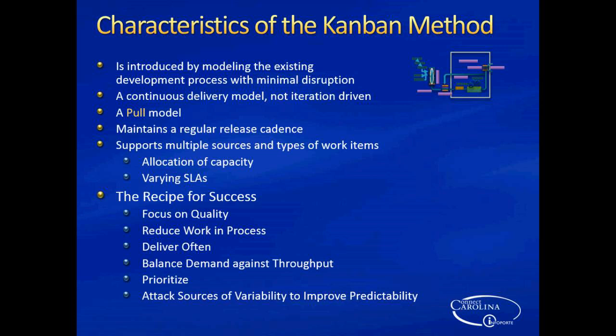That's the last item I've got. I can reach out and probably confer with your project manager or other team members and pull the next piece of work in. It's not pushed in, you're pulled in so that you are maintaining with little variance the work in process restraint.